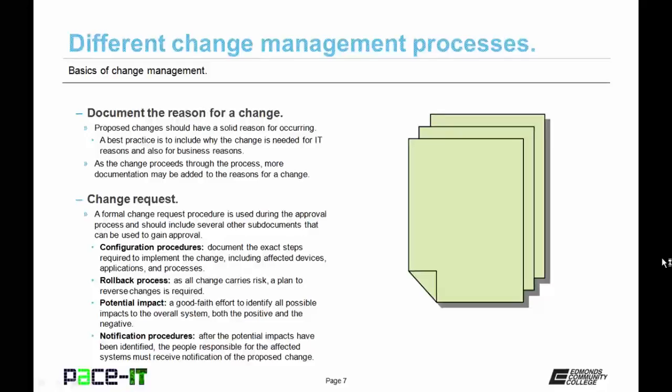The change request should also include a rollback process. As all change carries risk, a plan to reverse changes is required in order to gain approval. Then there are potential impact documents. The potential impact documents are a good-faith effort to identify all possible impacts to the overall system, both the positive and the negative.